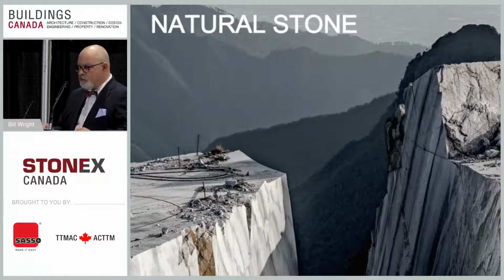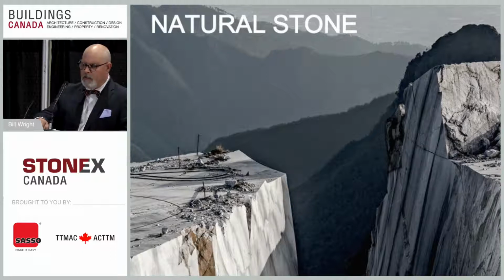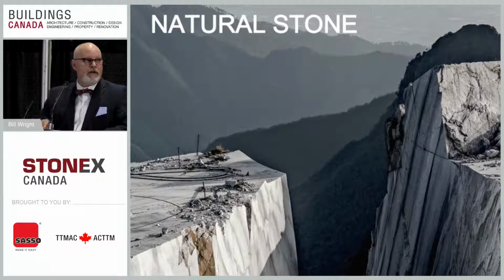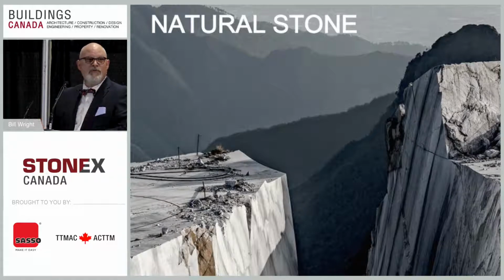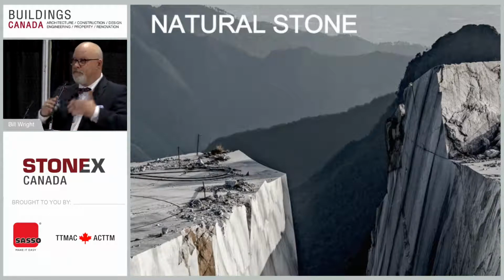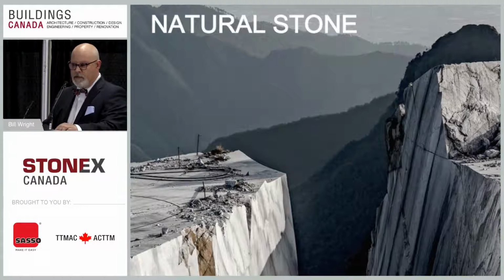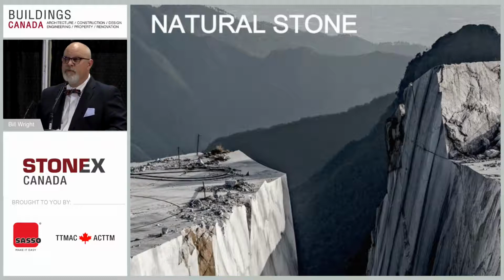We had an issue at my company that somebody wanted a very nice white stone with a little bit of veining, but it can come with some pretty dramatic veining as well. And they dropped off a sample, and the architect loved the sample. It was the best sample that somebody could have created, and submitted it, and lo and behold, it was approved. And it was shown to the owners. Everybody liked it. It was given to the tile contractor as a control sample, and they ordered a white stone, and it came more to the dramatic side than the very, very understated side. That control sample was communicated to everybody except us, so we didn't know what to order. We assumed it was a generic type of recommendation anyway.